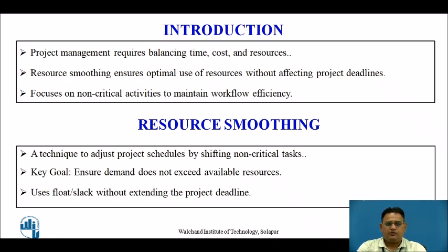Here, the important goal is to ensure that the demand does not exceed the available resource. Finally, the resource smoothing technique uses the slacks and the floats associated with the activities and the events, which is really helpful for resource smoothing without extending the project deadline.